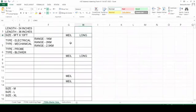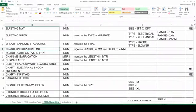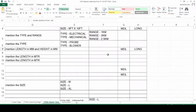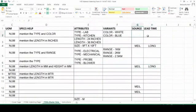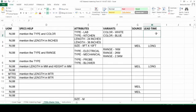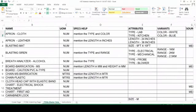Next you can see barricade boards — you have to mention length in mm and height in mm, so we can prepare them. This is also fabricated in our MEL fabrication unit only and it takes at least a month to finalize for supply. Every other item where source and lead time is kept blank — source is from the vendors which we are regularly buying PPEs from. Lead time is the stipulated 15 days which we are providing in this new process — from the day we receive your indent, material should be supplied within 15 days. That is our target.